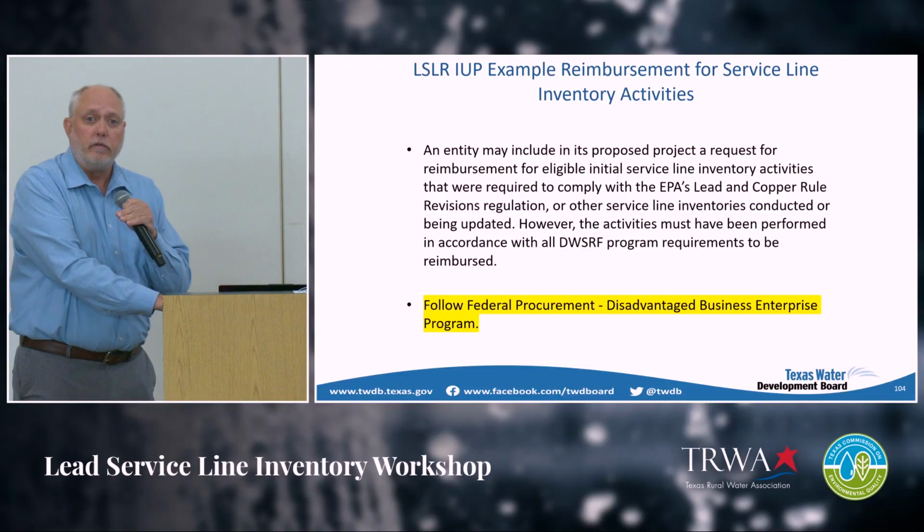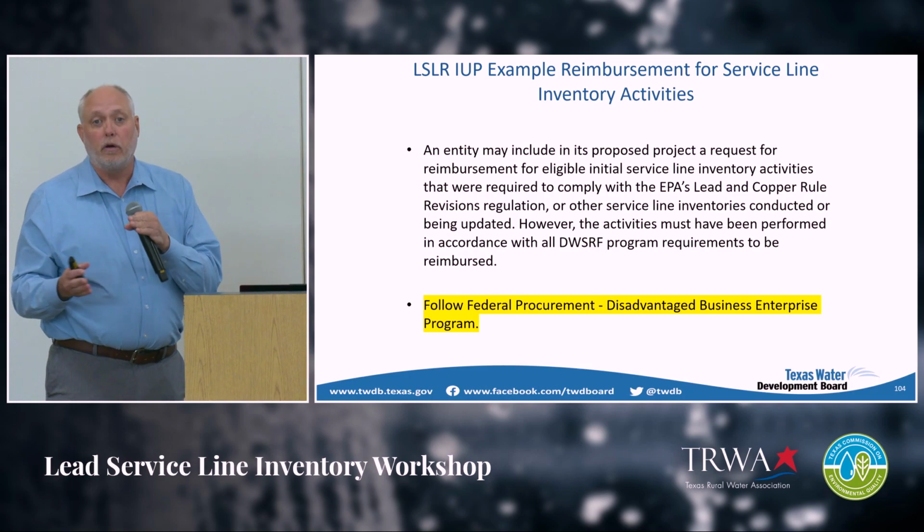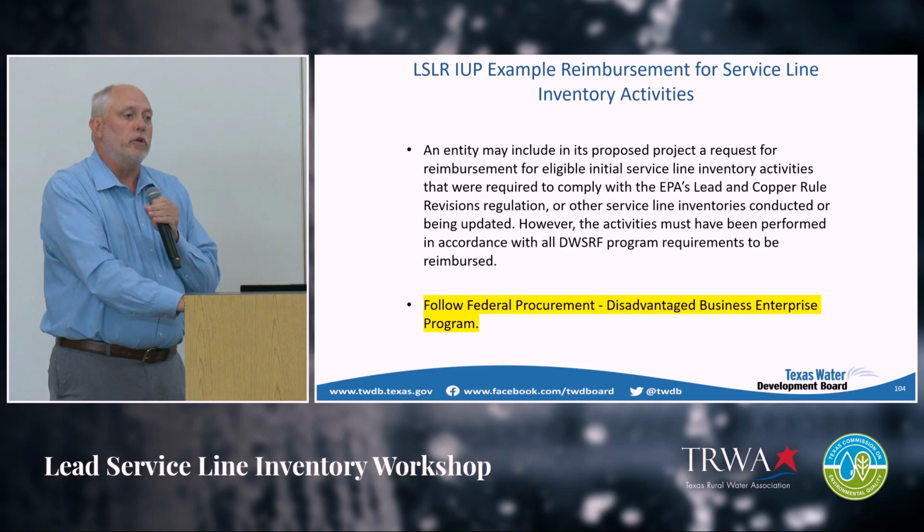We're talking about reimbursement is an acceptable activity. Like if you're working currently on your inventory work, make sure you keep that documentation if you want to be reimbursed. However, the real critical step or component of reimbursement is to make sure you're following the federal procurement process.